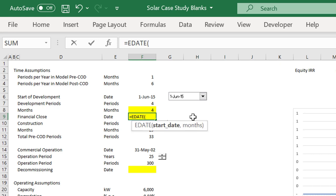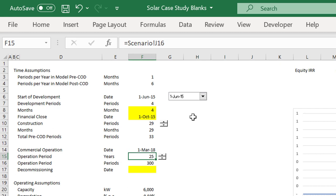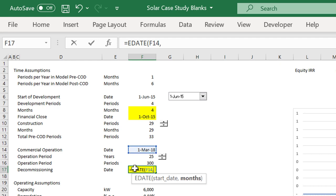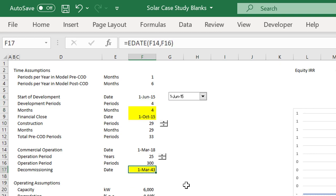During the development period we model it monthly. For financial close we use EDATE - we put in the start date of the whole project and use months, because of February and other months of different lengths. Then we have a 25-year life which can change. We multiply 25 years by 12 and use EDATE to get the end date - that's our 'death date,' summarizing everything.